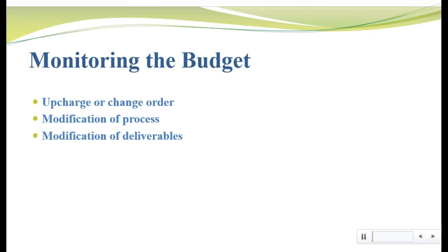Once you know what your budget is, you need to start monitoring it. How do you monitor a budget? First, you make sure, again, you know what tasks are included in the budget and the number of hours estimated for completing them. For projects that are being handled internally, you might not have a contract, but there will still be a set of department metrics that tell you an average of 45 seconds is required to enter a page of data. There might also be indication or project-specific metrics that tell you that for complicated indications like oncology, you might need 60 seconds per page.